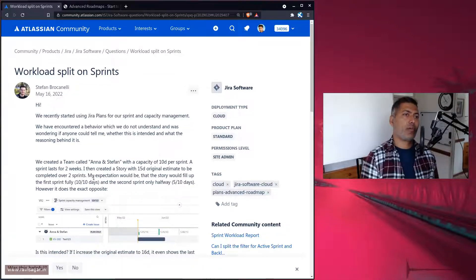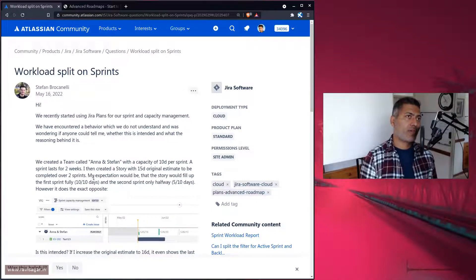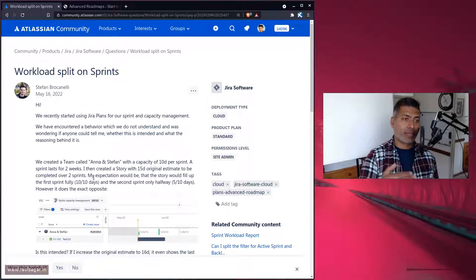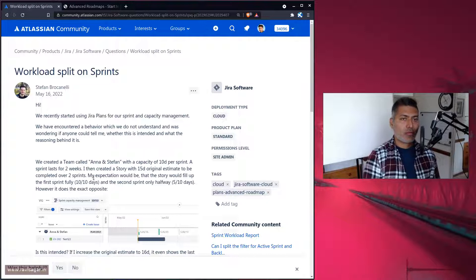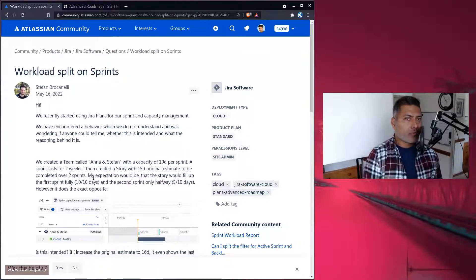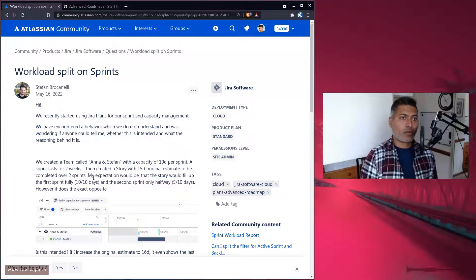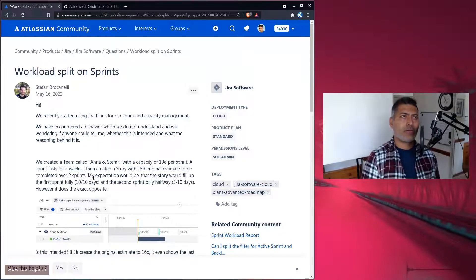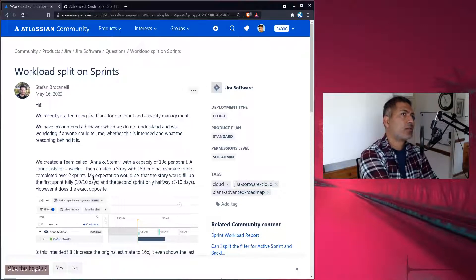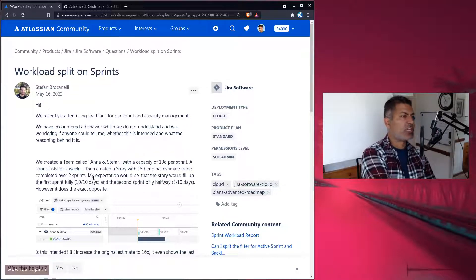That input is your number of items like stories. If you're using advanced roadmaps, also try to use the hierarchy, because it will help you in planning across multiple sprints or for the next few months. Stories are supposed to be delivered in the same sprint. Epics can go on for maybe two or three sprints. And one level above epic, you can use advanced roadmaps to create those levels, like maybe features or initiatives.